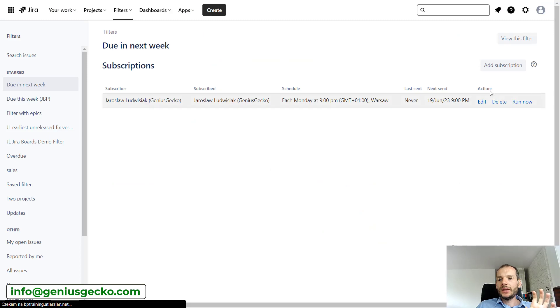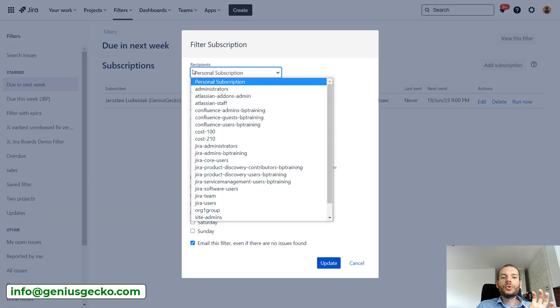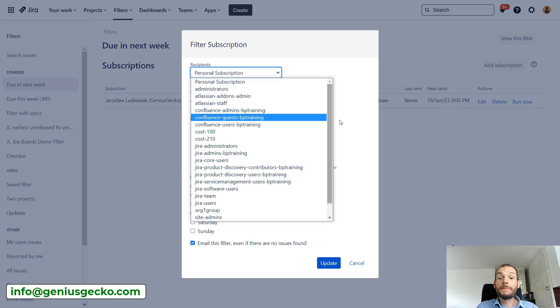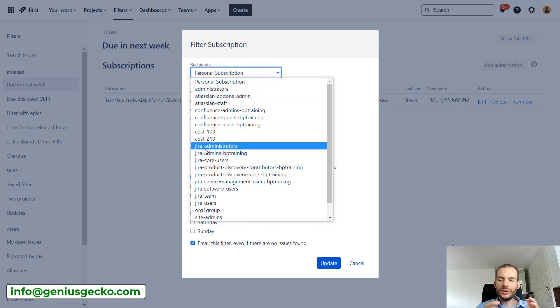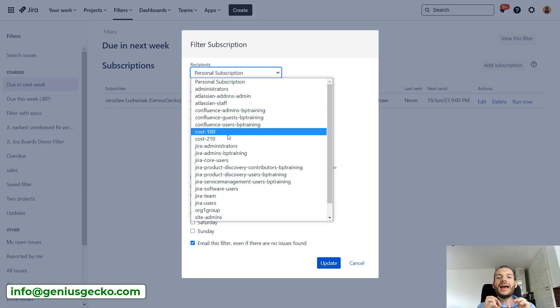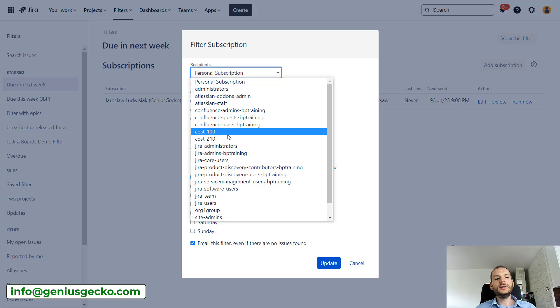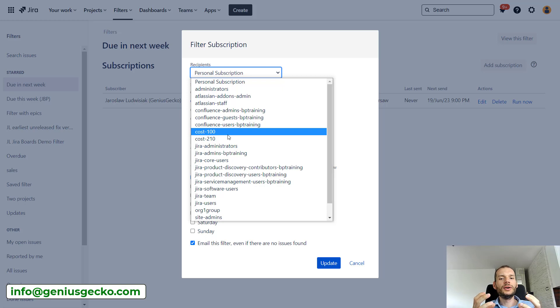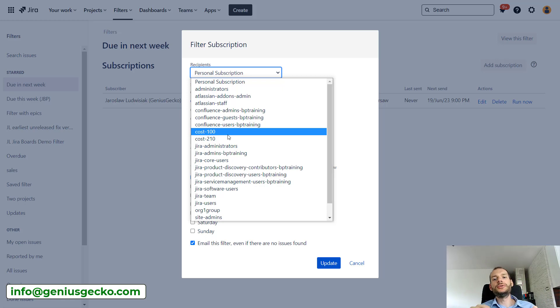Yeah, so we have this one. So this one was a personal, so only sent to me, but we can select specific Jira groups. So if we have a group representing our team or maybe other stakeholders, we could select this group, and then for every user in this group, the filter will be applied separately and they will receive their own email. So basically, you could imagine that we are displaying all the issues that a person is watching, and because this is what they are interested in, and sending email to them so that they know what is happening in the issues, whether the progress is okay or not, without the need to enter Jira and apply this filter.